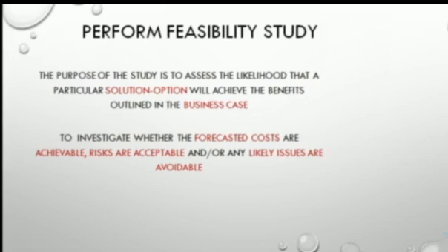So in the feasibility study, you carry out a forecast of cost. You understand? Forecast the cost that you'll be using to carry out this project and know if it is something that you can afford. Another reason to forecast the cost is that you can then compare it to the potential benefits that you are to make from this project and see if the benefit outweighs the cost, before you know if you have to embark on the project.